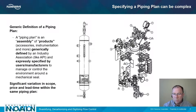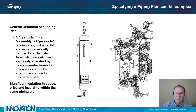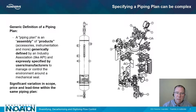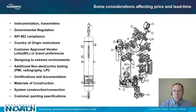That oil and gas Plan 53A can easily exceed fifty thousand dollars — I've seen it reach as high as ninety thousand dollars — and can have a lead time of up to 26 weeks. It's important to understand that these are both Plan 53As and they both do the exact same function for the mechanical seal. But as you look at different options in instrumentation and scope of supply, you can end up with very different products.